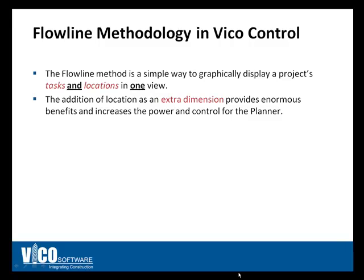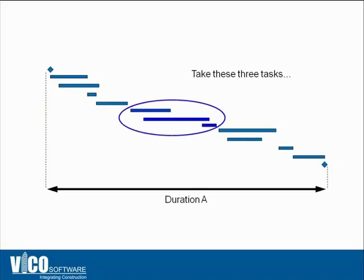Line of balance means the ability to graphically display tasks and locations in one simple view, as opposed to a purely activity-based schedule where locations are not represented automatically. Having locations added as an additional dimension provides a lot of benefit: it increases the planner's control, creates a deeper understanding of the relationship between tasks, and allows the planner to see what's going on at a glance rather than spending time investigating multiple pages of printouts.